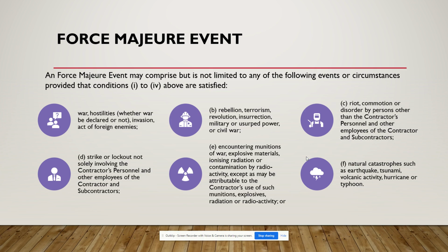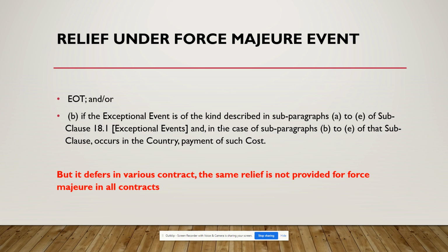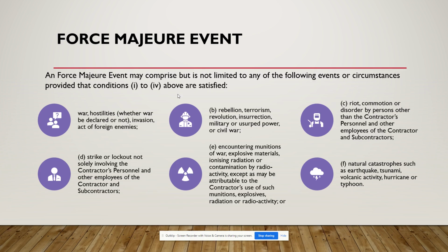You should notify; you just note it is as per the FIDIC contract. If in your particular project contract this word is not there, then it will be a problem. Then it means only the conditions provided in your contract constitute a force majeure event. In that event, if the epidemic or pandemic word is not there, then it will actually be a problem. So whatever we are talking about now is about the FIDIC contract. So, we now found that the epidemic COVID-19 can be considered as a force majeure event.